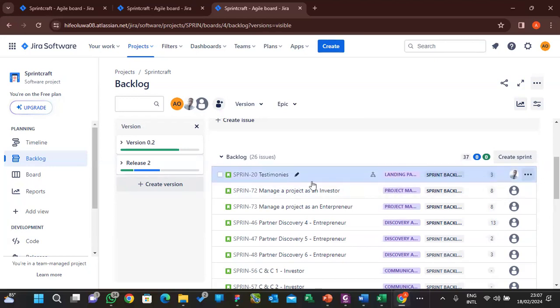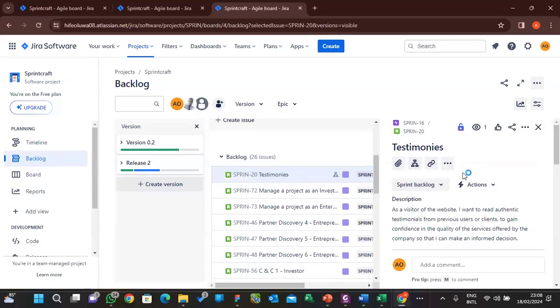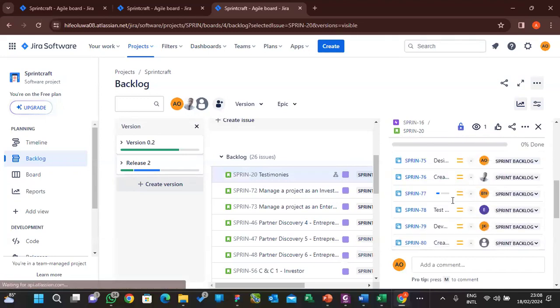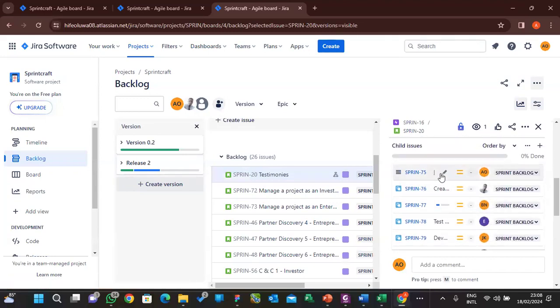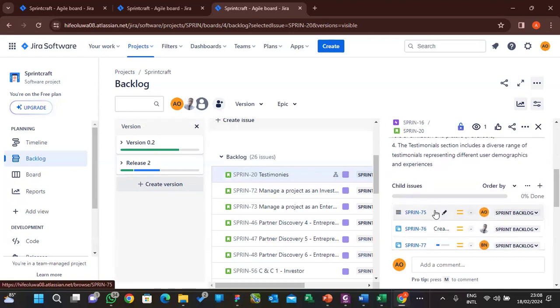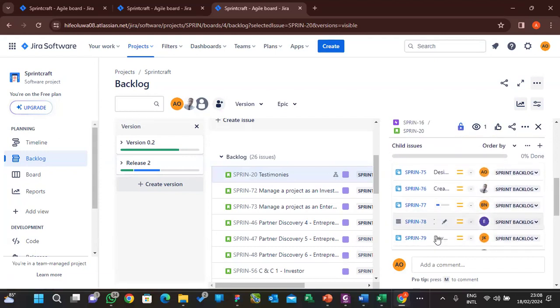Now, once they have agreed on three story points, the next thing the Scrum Master is going to do is ask them to break down this task. We ask them, which work are we going to do on this user story to deliver it? The first person will say, okay, design a phone frame, right? Then the next person says, create battery cover. Then do all these things and all that.